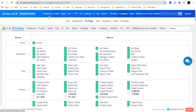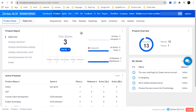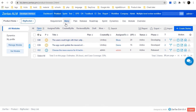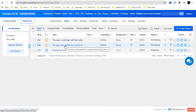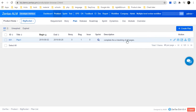Let's come back to the Product module. This module should mainly be managed by a PO. After the PO has communicated with the customers, they should gather all the user stories or requirements — essentially a product backlog in Scrum. As you can see here, we have a story list. Once you have created all the stories, you should go to Product Plan to create a plan and link all the stories you want to complete in this plan.